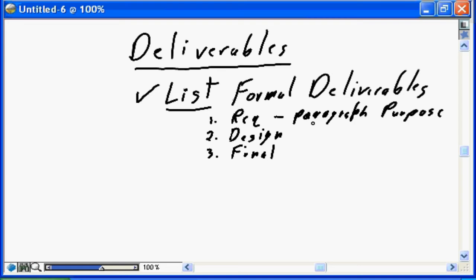You're better ensuring that the requirements document that addresses the 5 business requirements we stated is going to support the final goal for the business. The next step in defining the formal deliverables is not to just produce a paragraph defining the purpose. It's going to produce a full table of contents that says the requirements document is going to contain section number 1, executive summary, section number 2, evaluation of current situation, section number 3, evaluation of alternatives, section number 4,